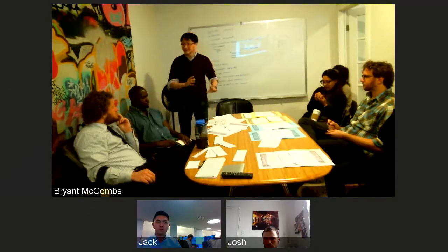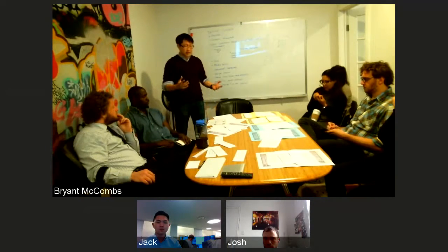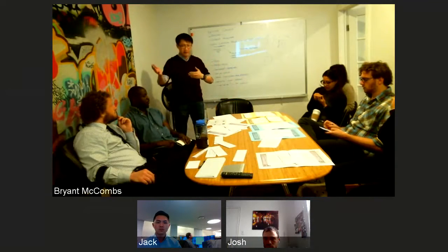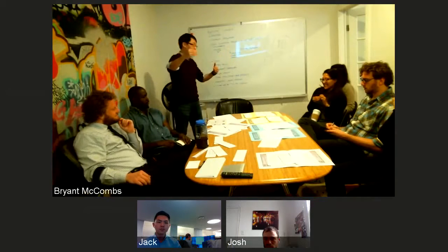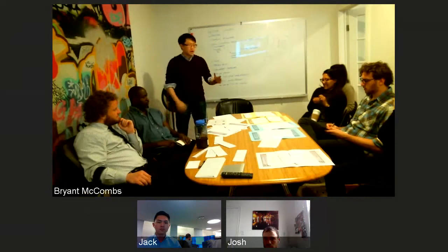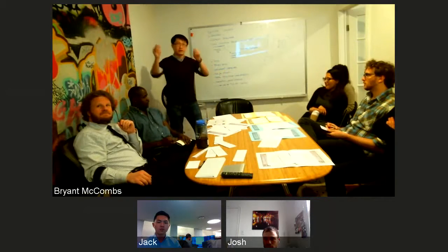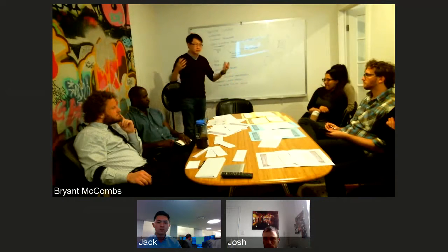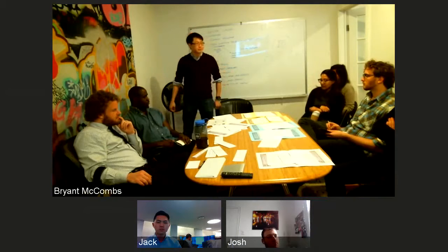This has worked for remote and distant clients. It's a lot harder. What it ends up being is the project manager creates two of these packets every week, and UPS is one of them out to them, and then they run the planning game over webcam in parallel, essentially, to say, okay, this is your final layout that you want. Make sure that I've got it right. Okay, let's save it down. But it's still them with their hands on real things every week making the decisions.